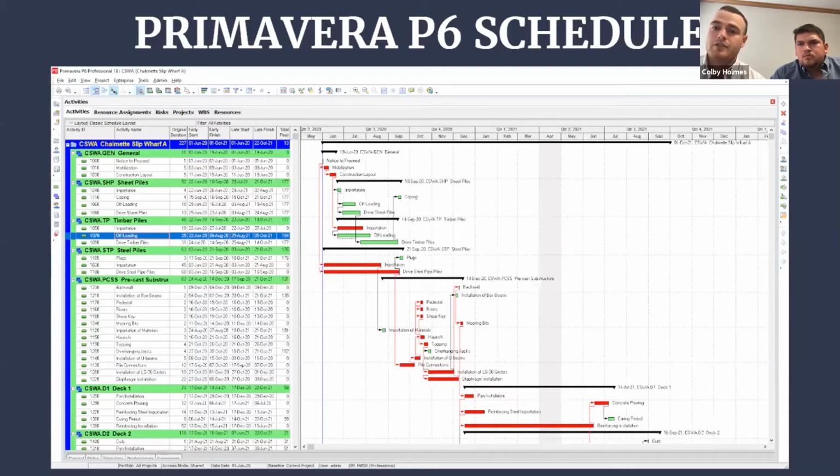So I'm not sure. I think it's ideal to have that little bit of extra time just in case something like that were to happen. I think it's better to account for it and it not happen than to not account for it and end up being 2 or 3 months longer on your project than what you told the owner. With respect to our bid and estimate, we tried to under promise and over deliver. So we tried to make it as worst case scenario as possible, just in that way, if it does happen, we accounted for it. And if it doesn't happen, we just finished that much earlier.